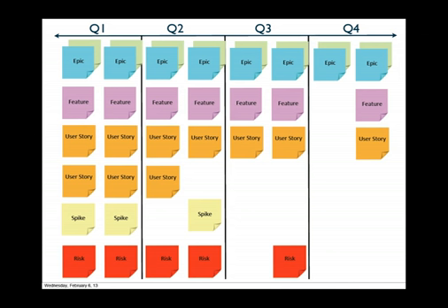It's hard enough to accurately estimate a sprint, let alone a release, let alone an integrated 12-month program doing Agile. So one of the strategies we talk about, and I want to tie a couple of ideas together, is when I'm putting a budget around an epic up at that top layer of the diagram on the screen, at the point that I've sat down with my architect and talked about where it fits in my roadmap and the kinds of technologies involved, and I put a SWAG on it, at that point, that estimate is no longer an estimate. That estimate is actually a budget.